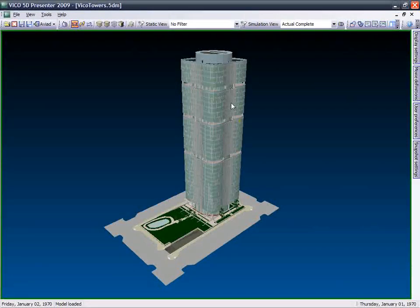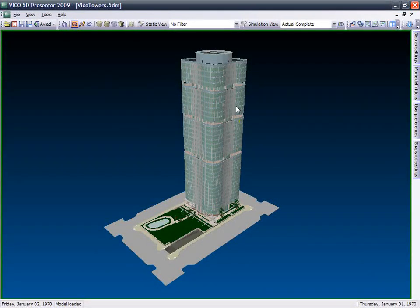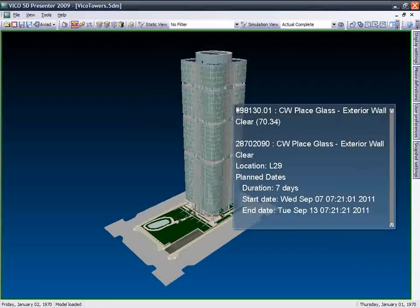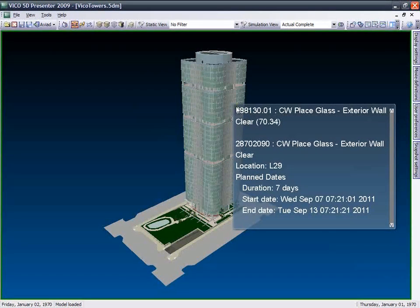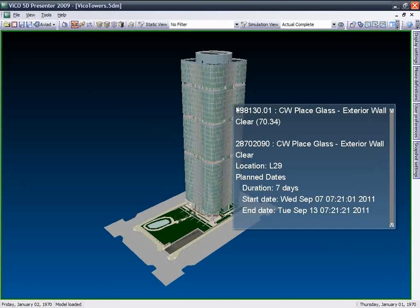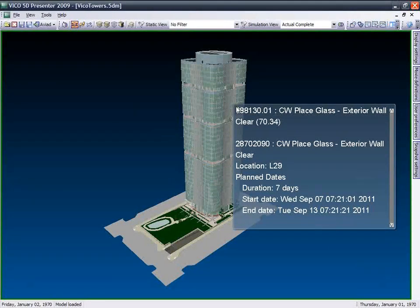Each object in the virtual construction model contains rich 4D scheduling and 5D cost information, including the methods needed to construct the object and the progress of specific tasks.